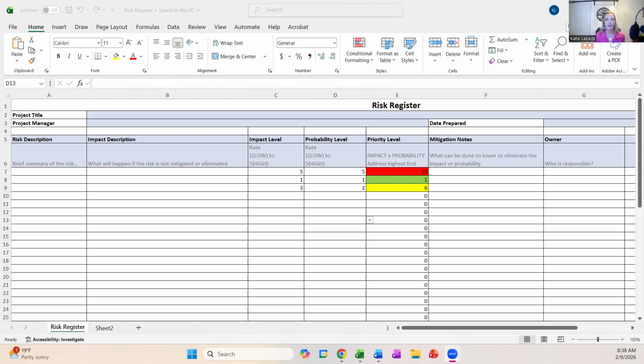Maybe I am working on a manufacturing project. And the risk in a manufacturing project, let's say you're putting a new machine into your building, the risk that you could have is associated with the other processes that will feed into that machine and the outcome of that machine into other processes. So that would be a risk that I would put in there, something in regards to the process inputs and the process outputs.